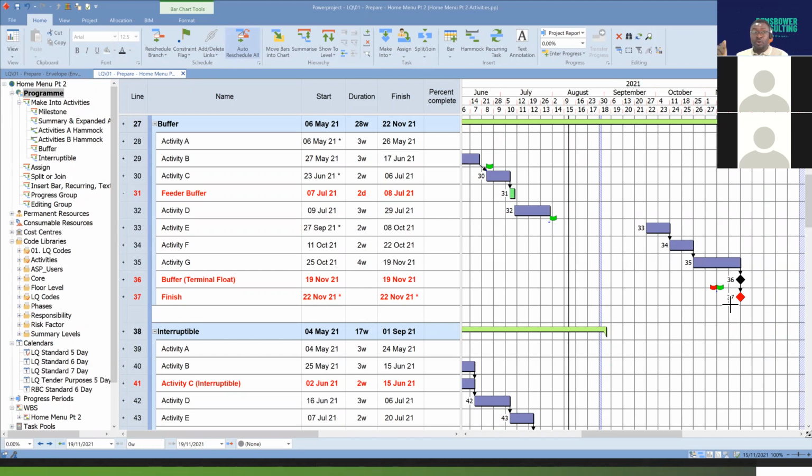That means caution, and that particular project gets flagged to the relevant construction director, that we are delaying at a very rapid rate, meaning there's a threat to our finish date. We need to start looking at mitigating measures, and he needs to step in and begin to ask the right questions of the site team to know what the issues are and how to correct them. Anything beyond 70% is red, and that gets flagged to my ops director to say we're in huge danger of our completion date. We need to do something. So then the pressure really mounts.